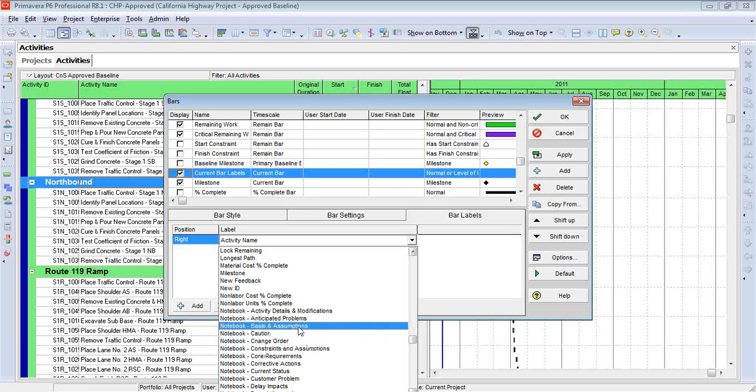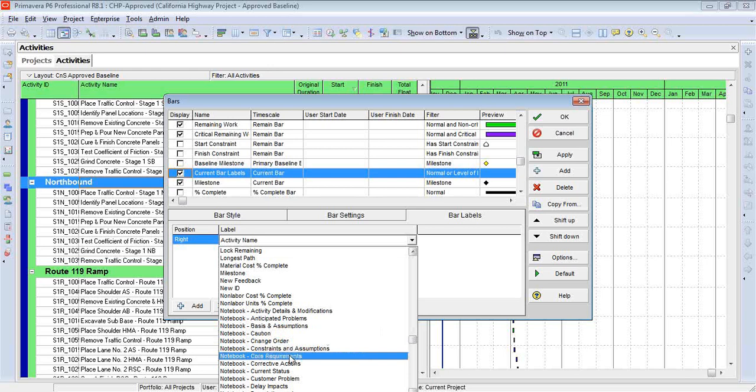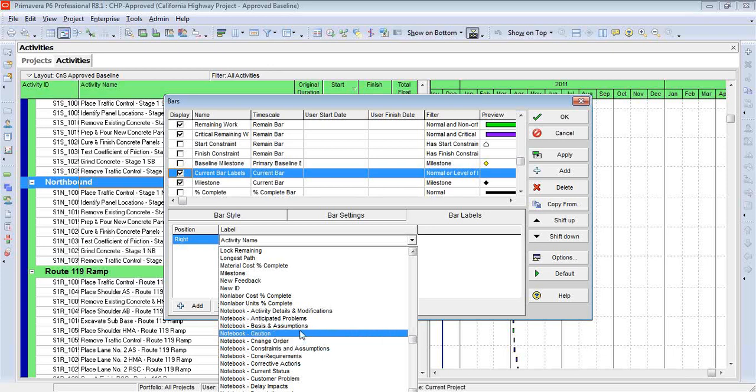Now notice we have the option here where we can show only one type of topic, which is nice. I can have certain Notebook Topics that are confidential. I don't want the owner to see these comments, whereas I can have other Notebook Topics that are public. I will show them on the Gantt chart.